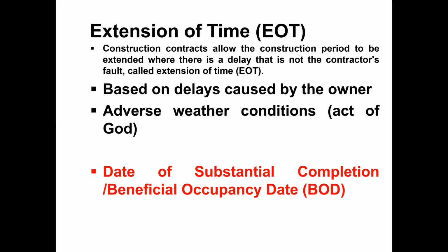So here we discussed what extension of time is. The owner can give extension of time if the contractor is not at fault, or the delay was caused by the owner, or there are adverse weather conditions. So from the starting point until project completion, this is the contract time. We have discussed issues during the construction phase.